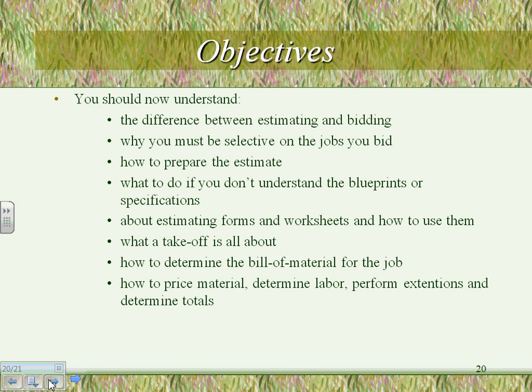That's what I don't like about this little software, because in one way it's inconvenient. In another way, it really helps you understand what an assembly is. An assembly, guys, is a switch, a cover, and a box all in one. Since we don't have software, you have to build your assembly. Every time you take a switch off, you have to ask yourself, have I accounted for the box for it? Have I accounted for the cover that comes with it? That's what this is supposed to cover.